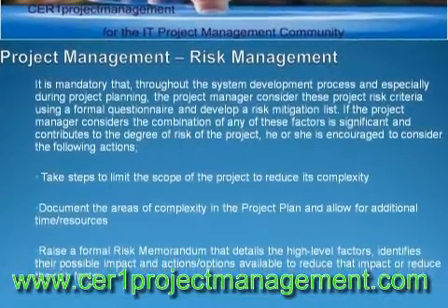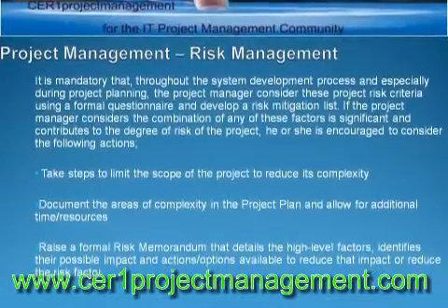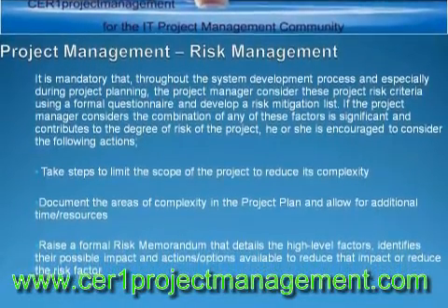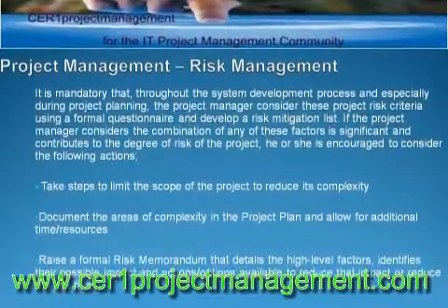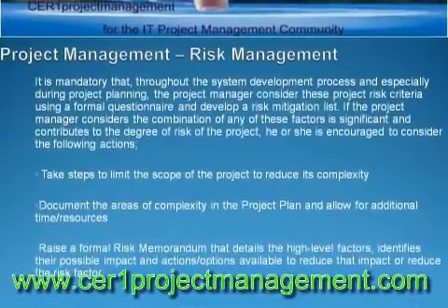It is mandatory that, throughout the system development process and especially during project planning, the project manager consider these project risk criteria using a formal questionnaire and develop a risk mitigation list. If the project manager considers the combination of any of these factors is significant and contributes to the degree of risk of the project, he or she is encouraged to consider the following actions.